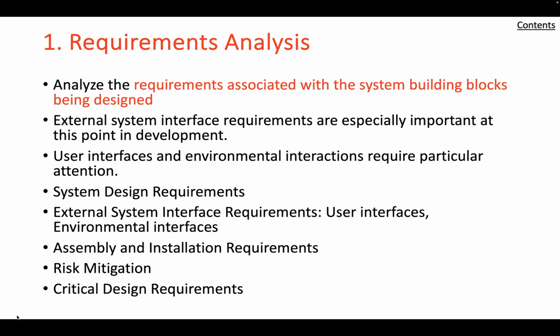By the beginning of the engineering design phase, those risks should have been resolved through further development. This in turn should have reduced the remaining program risk to a level that could be tolerated through the application of risk management, a process that identifies and seeks to mitigate the likelihood and impact of residual risk. Methods for mitigating risk are discussed briefly in a later section, and we'll get to that shortly.